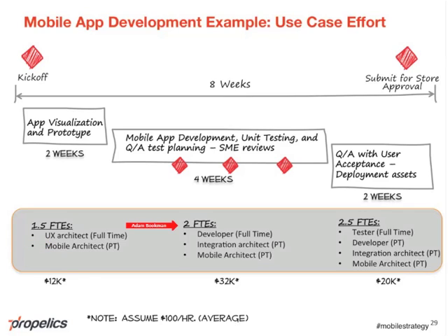In the development, we need the developer full-time, the integration architect. We knew we needed to reach in and do the LDAP or authentication. So we found a couple of weeks' worth of integration work, and then a mobile architect overseeing the specifications and standards for the operating systems. In the last 2 weeks, our tester is our full-time FTE.